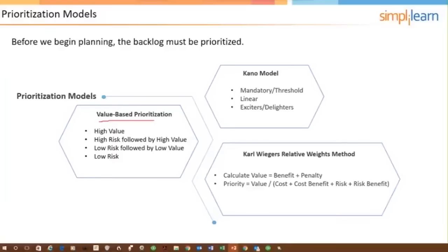And this is primarily the product owner with maybe some input from the team, just simply deciding what he or she wants done most, listening to the team say, well, there's some greater risks with this user story than that. And so you'd probably want to persuade the product owner to take care of high risk stuff first, because that would have an impact on the future things that need to be done.